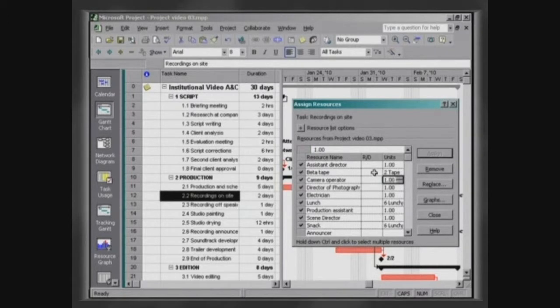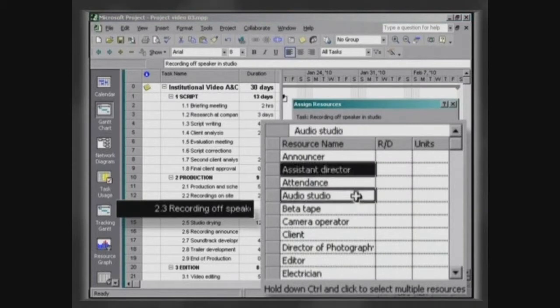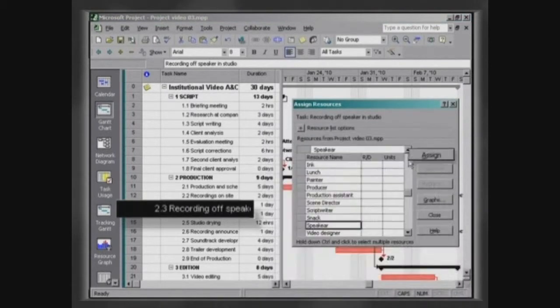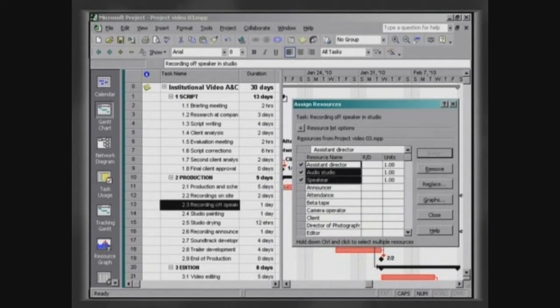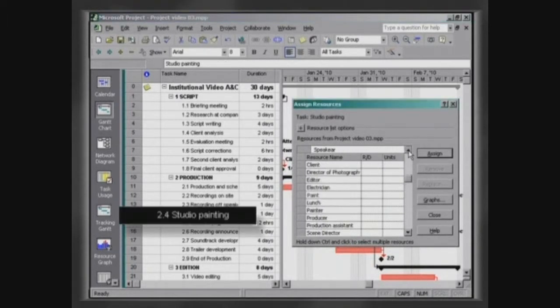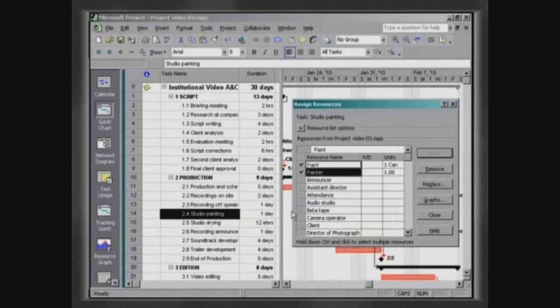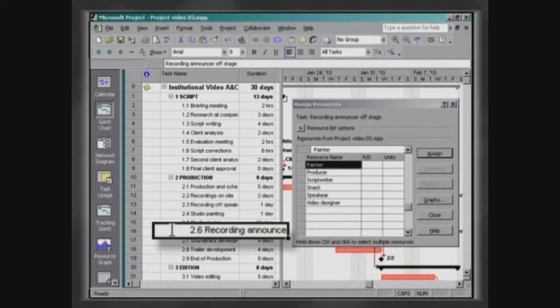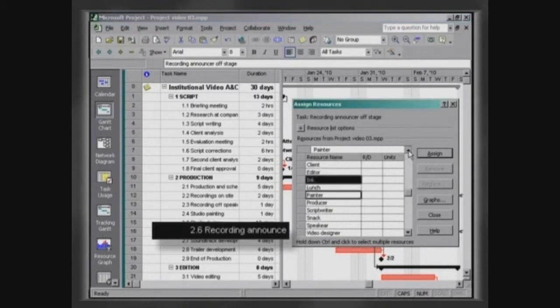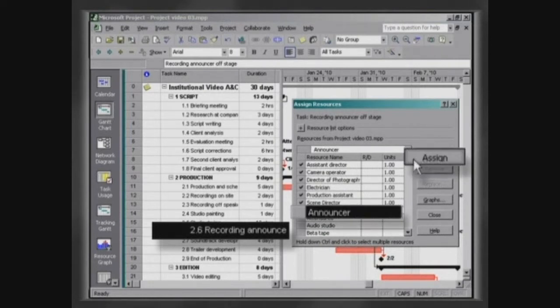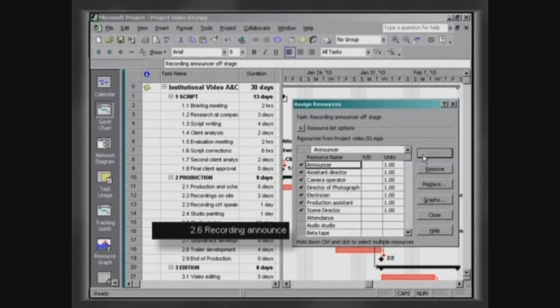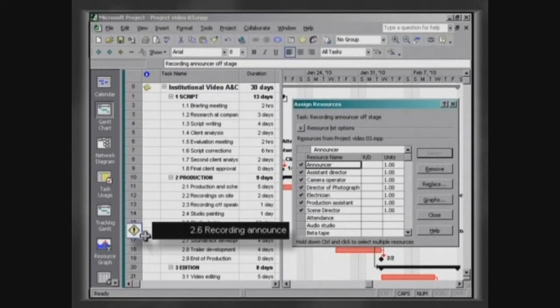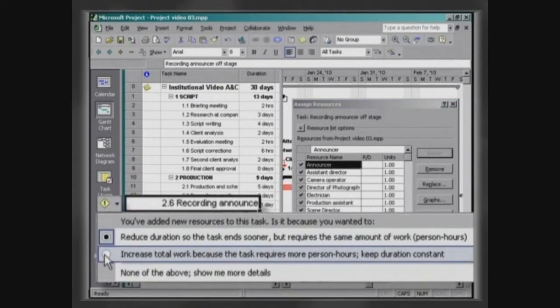Continue assigning the other resources Assist Director, Audio Studio and Speaker to the activity Recording off speaker. Paint and Painter to the activity Studio Painting. For the activity Recording announcer off stage, we must not forget to assign the resource Announcer. With this last attribution, the project points to an error and changes the duration of the task. Click on the exclamation mark and choose the option Increase Total Work.